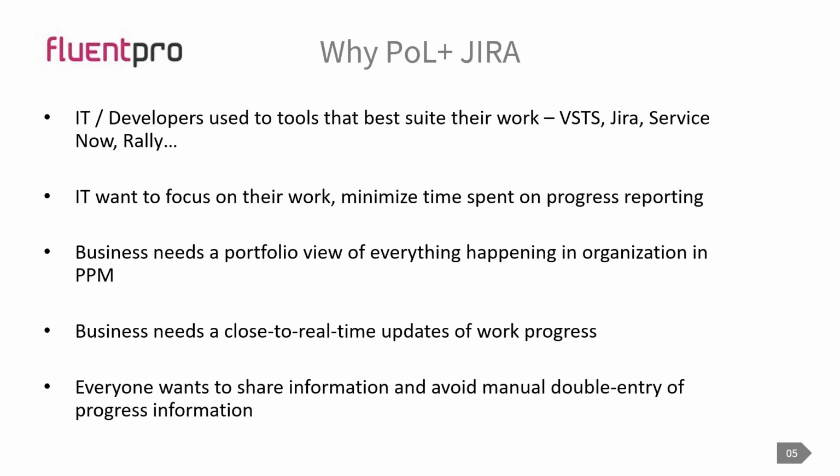At the same time, if you connect those systems, you can have close to real-time updates of work progress. You don't need to ask your project managers, okay, what's the progress? What did we do this week? Why is the project plan not updated? If the systems are connected, if your development team went to Jira and worked on tasks, completed some activities, all that will be automatically reflected in Microsoft Project Online. And as I mentioned, by automating that connectivity and integrating those systems, we really can avoid manual double entry.